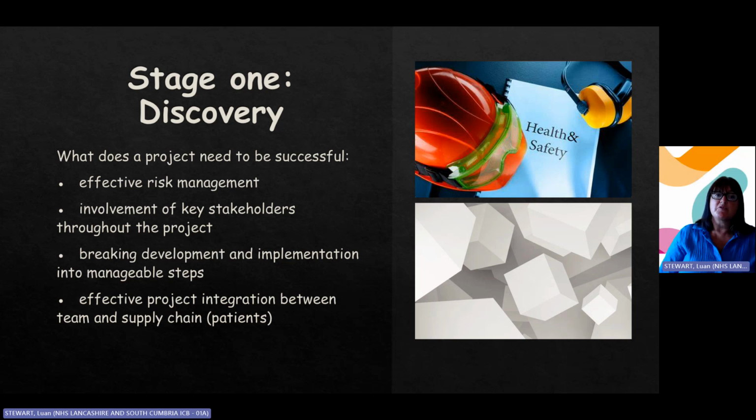If this is a project, for instance, that would involve a patient project, where you are moving those patients into some particular council-led facility, your local council might hold local facilities that you are trying to send your patients to. We need to involve those stakeholders from the council to make sure there is a place, or that where we're thinking would be a really good place to send our patients isn't just about to close down for refurbishment. So get those key stakeholders involved right from the beginning.